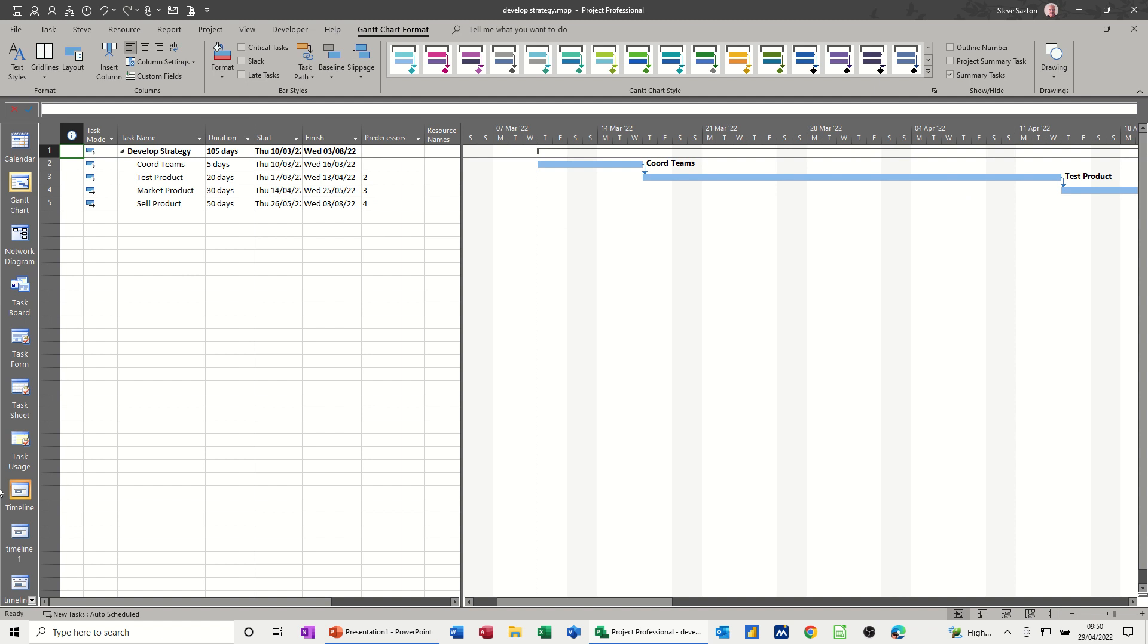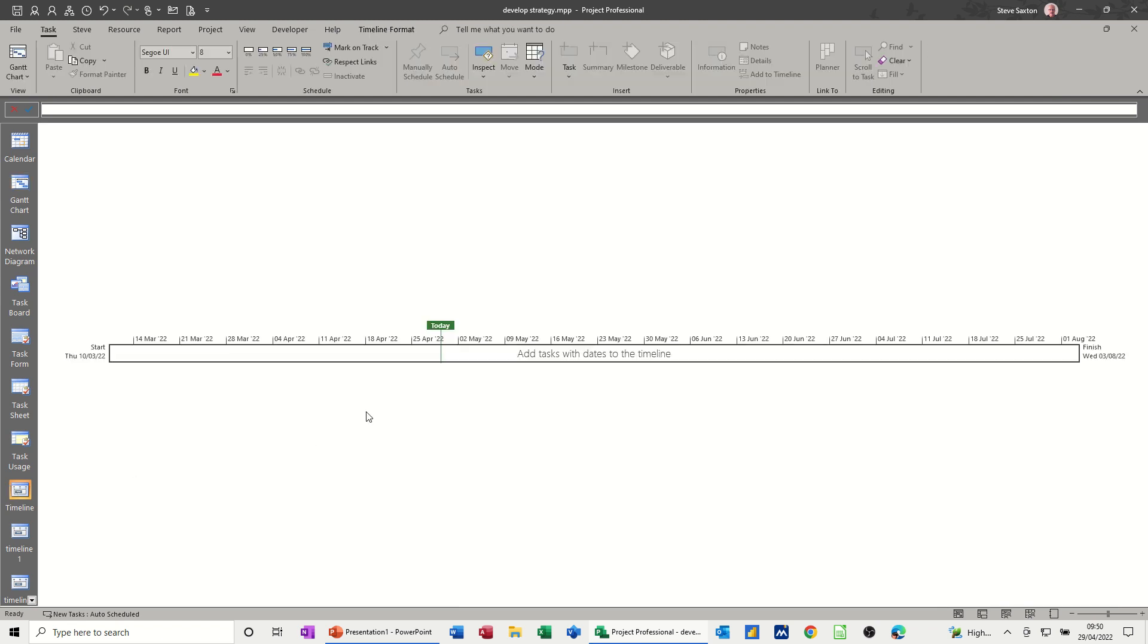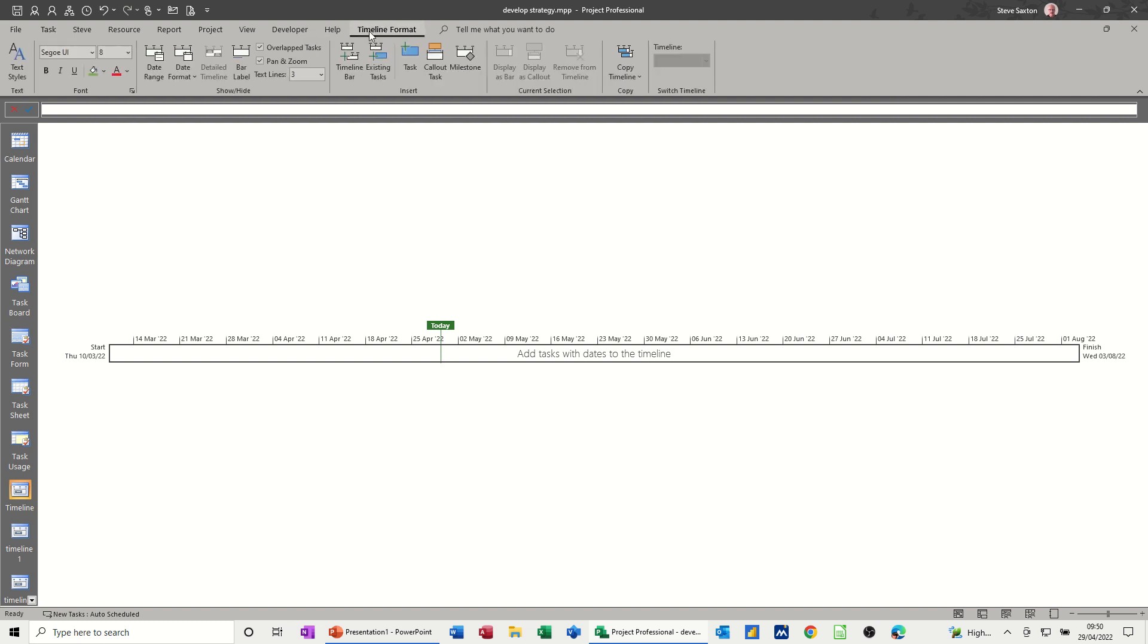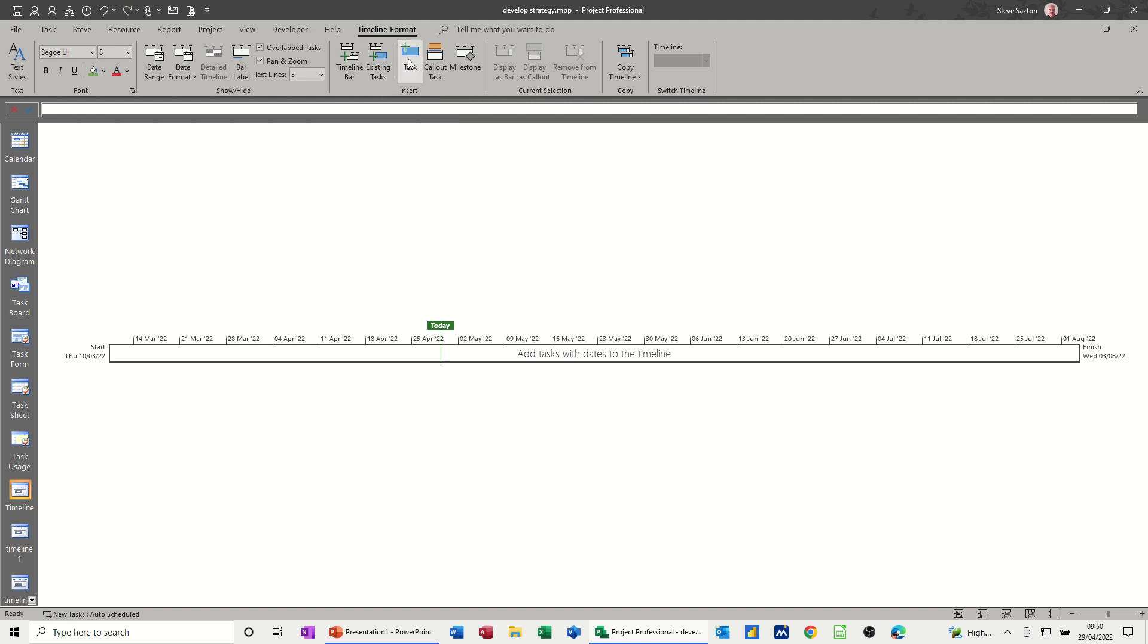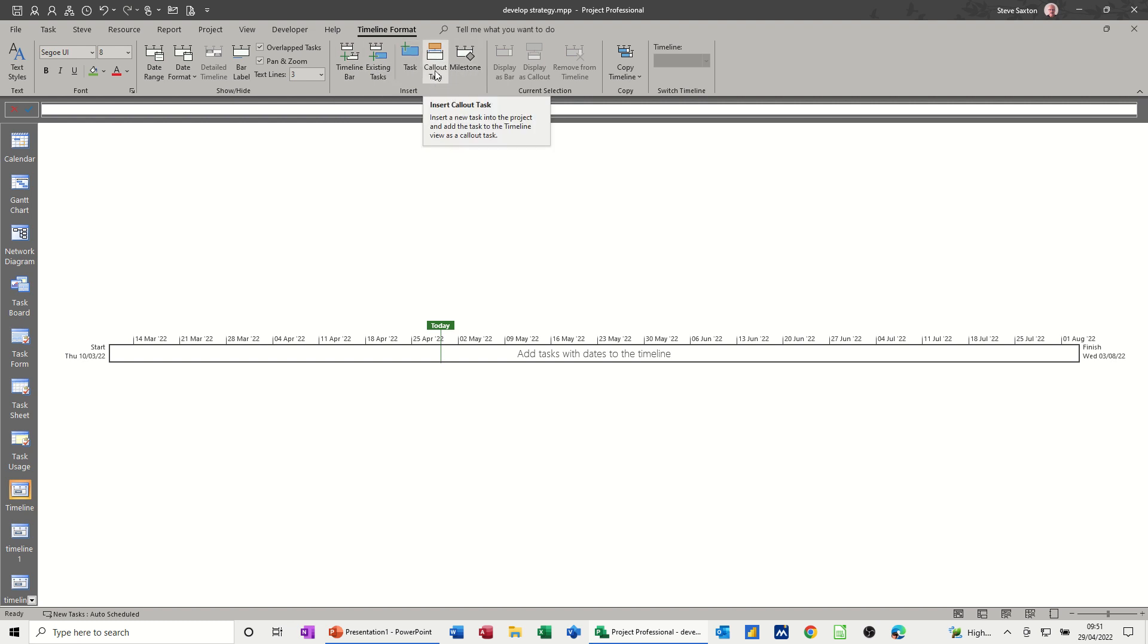Now if I go down to the timeline view, there is the timeline, so it's a default timeline. You have this tab timeline format, which appears once you go into there, and what you can do now is format this. So in the middle, you've got this insert group, so timeline bar, existing tasks, new task if you want to create new tasks, and then how you want them displayed, callout and milestone tasks.